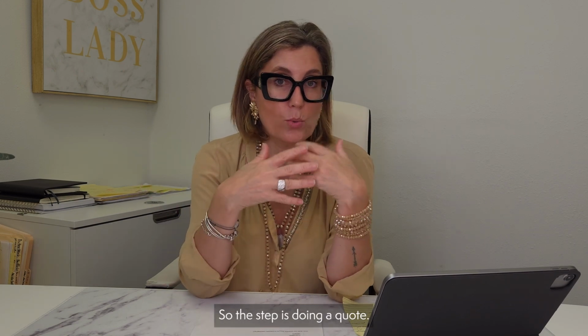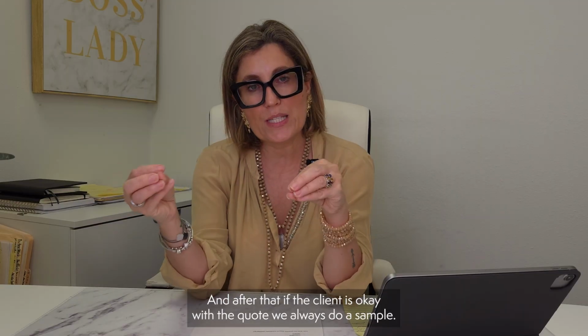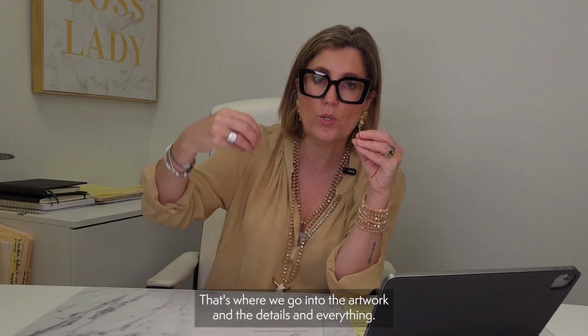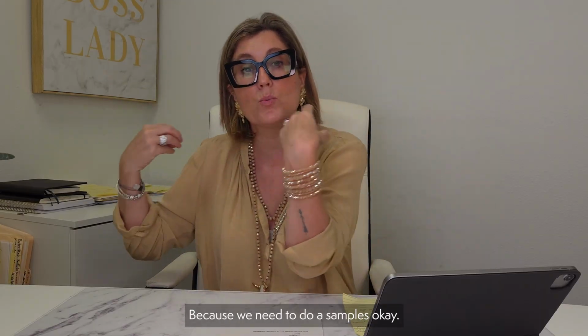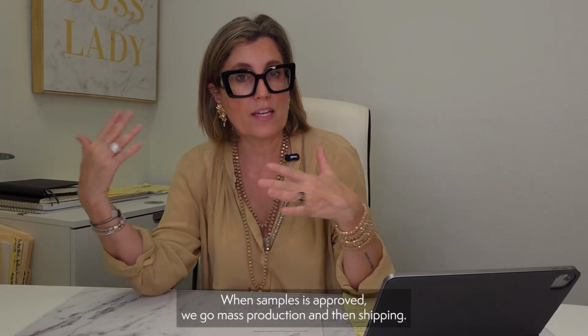So the step is doing a quote, and after that, if the client is okay with the quote, we always do a sample. So that's when the designer team comes in. That's where we go into the artwork and the details and everything, because we need to do a sample. Okay, when the sample is approved, we go to mass production and then shipping.